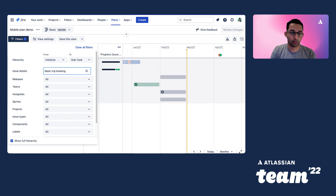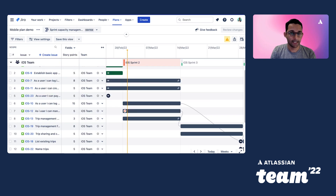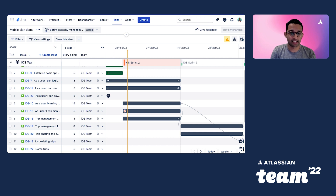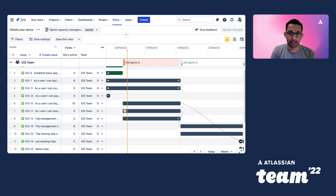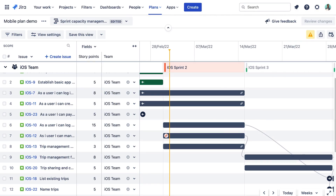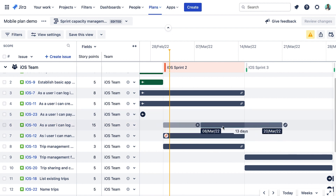Modern agile teams need to account for their team's capacity to set a feasible timeline and of course to stay happy. Advanced Roadmaps has smart capacity planning features built in. It shows you when your planned work exceeds your team's capacity, so you can identify when your teams might be overloaded and adjust accordingly. We can see here that iOS Sprint 2 has a capacity problem as it's turned red — one large issue is 15 story points and has blown out the capacity. We can easily move that issue to the next sprint, iOS Sprint 3, and now the load is balanced across two sprints.